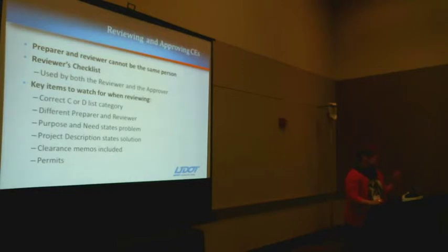Make sure you have all of your clearance memos. They should all be signed, or I should say, letters that need to be signed. It should be the signed version in the CE. For Native American letters, we want a copy of the signed one, because if it's not signed, how do we know it really got sent out? Same with a DOFO that we send to SHPO. We need to have proof that SHPO concurred, so we need to have that signed copy.